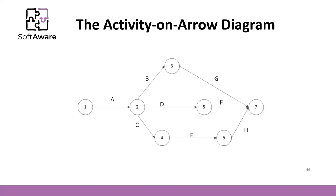Let's look at the representation. We have nodes and we have arrows. Each arrow represents an activity, a work package, a task. Node one connects to node two, and it's task A. After task A, you can have in parallel three tasks — B, D, and C. Task B goes from node two to three, task D from node two to five, and task C from node two to four. Activity G can only be performed after A and B end. F can be performed only after A and D end. And H only after A, C, and D end. This is the meaning of the diagram.